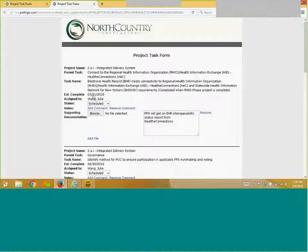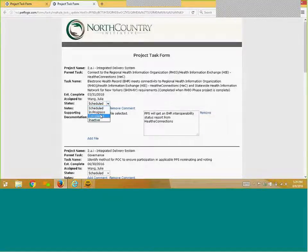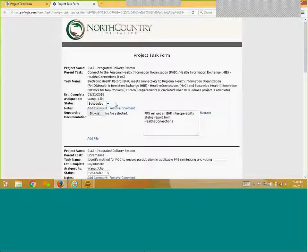The last three fields in each section are the fields that require your updates. Click on the drop-down box to update the status of your task. You can choose from Scheduled, In Progress, Completed, or Inactive.